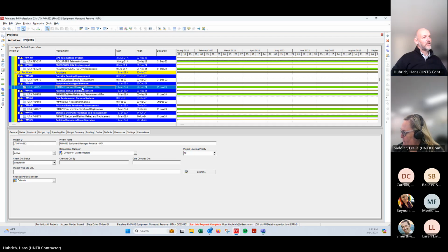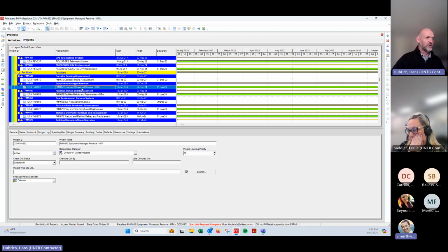I'll go back up here to the live project and do my updating in the live project. And then if everything goes well, next time I do the sandbox trick, I just delete the one from previous. You can see my sandbox has a bunch of stuff in it right now that I don't need anymore. But my live version is up here in the actual project listing. So I can go through my sandbox and clean that out from time to time and delete any older project that is no longer serving as my temporary backup.